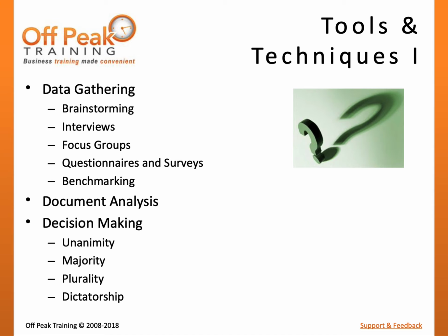When a large or broad audience needs to be reached, questionnaires and surveys can be used to help identify requirements and provide data which can be used for statistical analysis. Benchmarking can be used to compare stakeholder business processes and needs to existing organizations with similar operations.